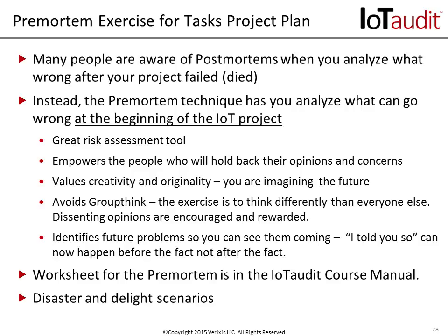Here I wanted to take a minute and talk about what's called a pre-mortem exercise for your project plan. Many people are aware of post-mortems, where you analyze what went wrong after your project failed, or in some cases even worse, died. Instead, this tool we've used with great success is the pre-mortem technique. You analyze what can go wrong at the beginning of your IoT project. So this is a fantastic risk assessment tool.